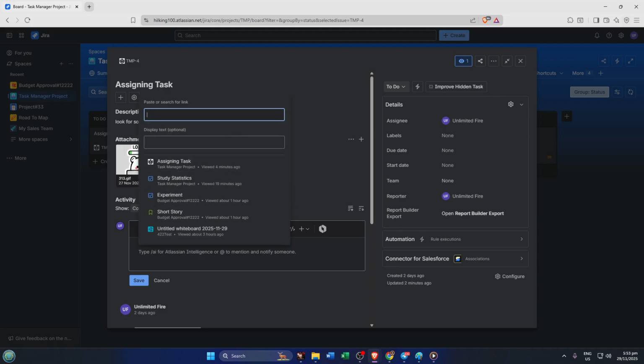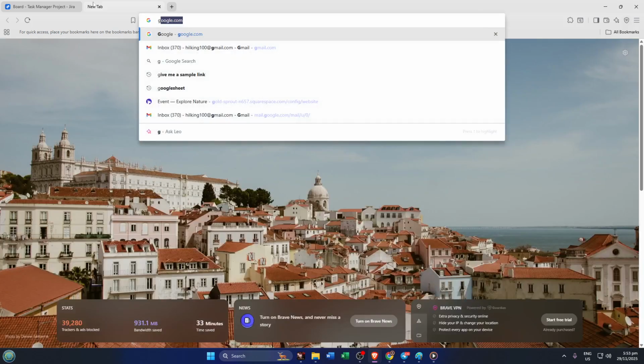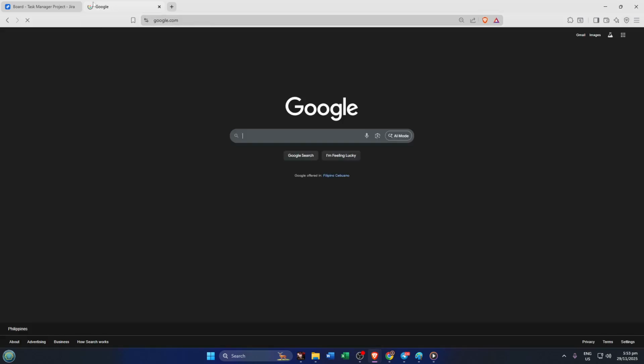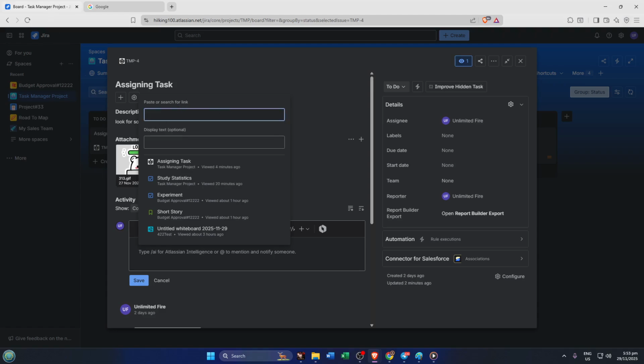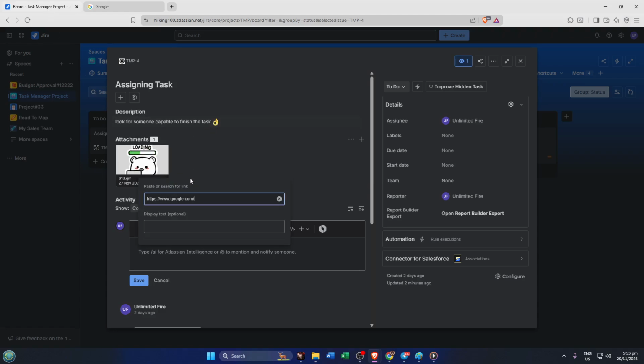The first important choice: you'll need to select the type of relationship for the link. Maybe this issue relates to another, or perhaps it blocks a different ticket. Selecting the right relationship isn't just about formality. It adds critical context. For instance, if one task can't be completed until another is done, marking that with "is blocked by" makes prioritization much clearer for everyone looking at the issue.